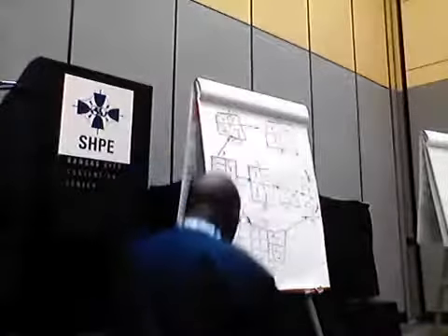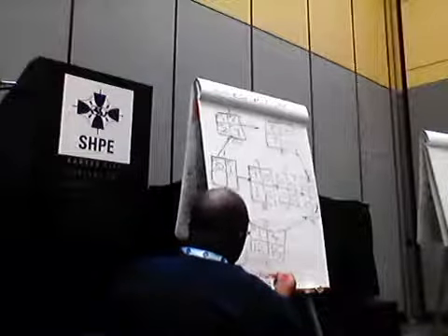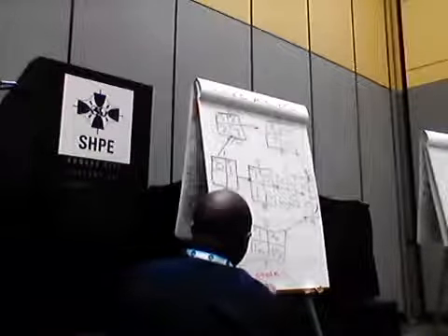The rule going backwards on your backward pass, and I'll just put it here: always choose the lowest late start on your backward pass.